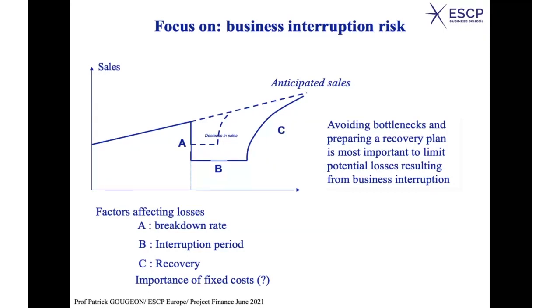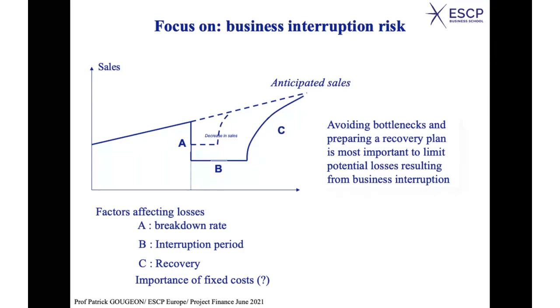Then you have to be prepared for a recovery plan. How are you going to accelerate the recovery? It means, for instance, you have to be ready to cope with rebuilding a facility that has been destroyed. Do you have the plan? Do you have the administrative authorization to do so? You should anticipate that. And by anticipating that, you may win months, several months.